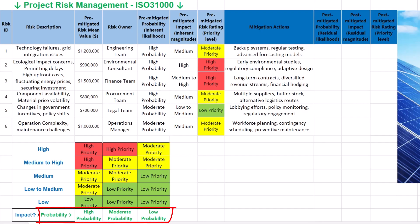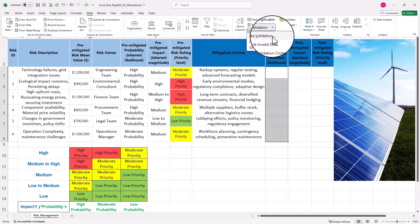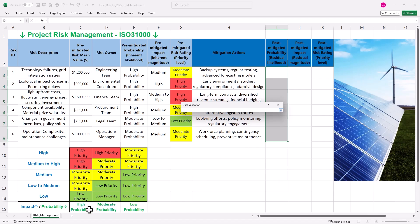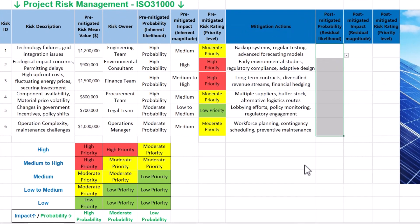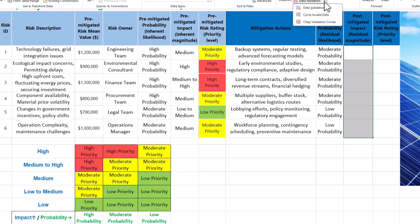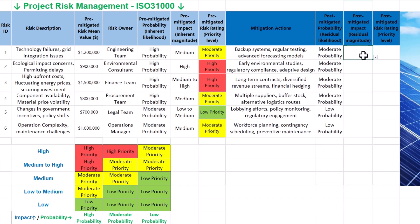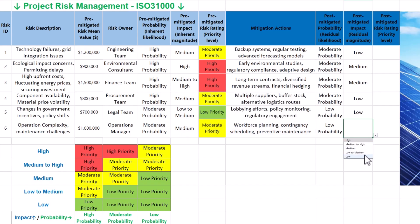Based on our risk matrix, there are three values assigned to likelihood or probability. To minimize human errors in data entry, we use the data validation tool in Excel to create a drop-down menu. Select the relevant cells, navigate to the Data tab, and select Data Validation. Under validation criteria, select List, then specify the data source by selecting our defined likelihood values. Each cell now has a drop-down menu from which residual likelihoods based on our risk matrix can be selected. We follow the same procedure for residual magnitude or impact, specifying the five possible risk impact values. An error message appears if we try to type a value outside the predefined list.